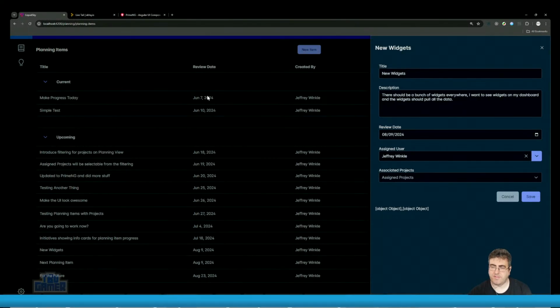So my advice, if you are in a planning meeting, is to never, ever start planning the development at the same time as you're planning the actual work. Those planning meetings should always be about asking questions and understanding what is expected versus actually promising delivery of anything. I think that's where a lot of developers fail. So I oftentimes try to protect developers from themselves and say, shut up.